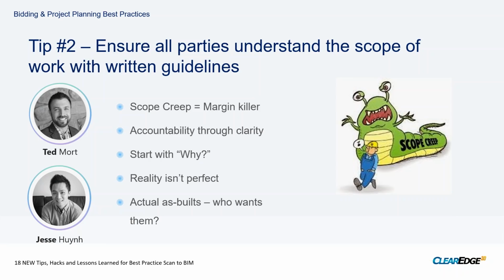Yeah, and I would add, go ahead, Jesse. Sorry about that. I would add that understanding the why is also really the end product of what you're approaching. So whether you're trying to get a Scan-to-BIM that is actually for as-built purposes, or you're using it for coordination, or any other kind of purpose, depending on what you're intending to use a model for really drives the scope that you're trying to set forth early on in the project.